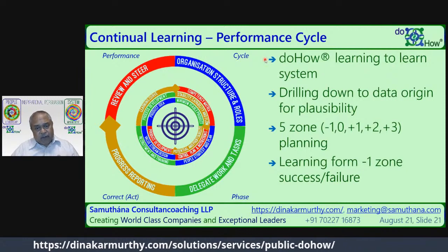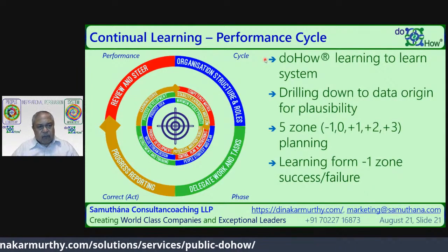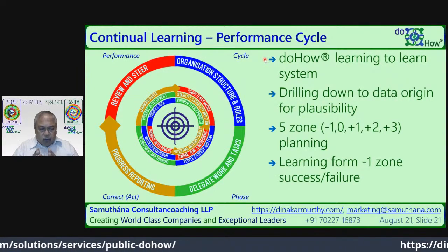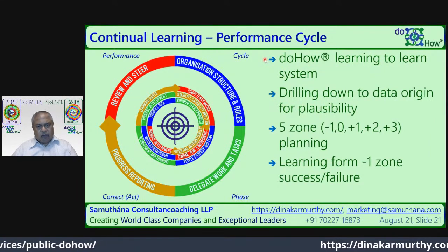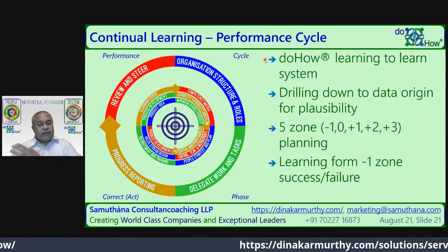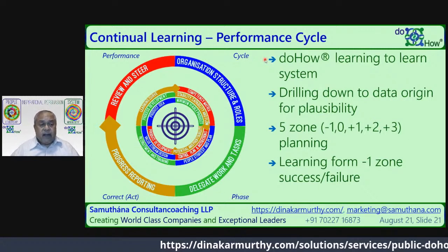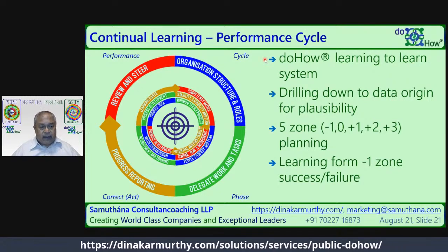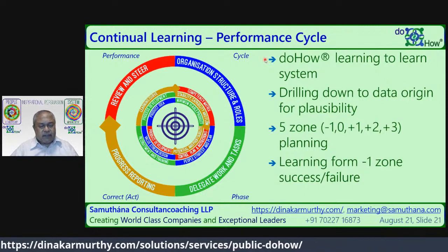And for tomorrow, the same thing about the full kit. Day after tomorrow also about full kit, because today's plan is something which is already frozen. Tomorrow's plan was frozen yesterday. Day after tomorrow's plan is something which we freeze today, and there human intelligence is required, where we can discuss amongst ourselves and come to a decision whether it can be done or not.